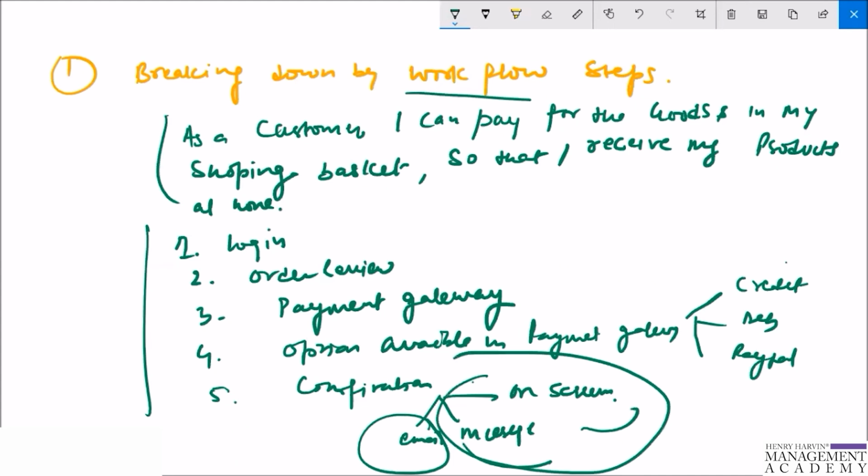This will certainly limit the functionality of the web shop, but it does allow a Scrum team to review, or maybe even deploy, the completed functionality at the end of the sprint, test it and use the feedback to make the necessary changes. So this is the first method by which you can split the user story, with the help of the workflow.